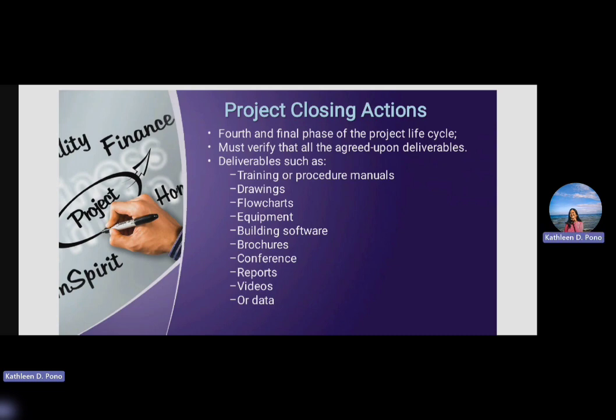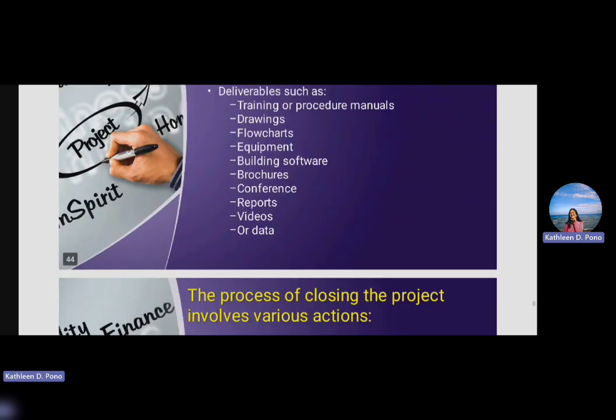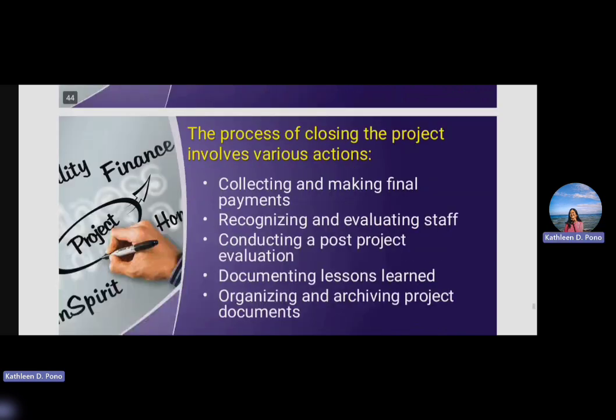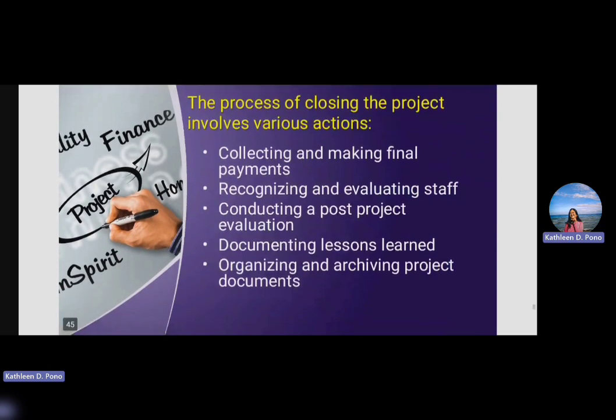So now let's proceed to the process of closing the project, which involves various actions. First is collecting and making final payments. This means ensuring that all financial obligations related to a project are met, including paying vendors, contractors, and other stakeholders. The actions involved may include reviewing invoices, confirming that all services and products have been delivered as agreed, and reconciling accounts to ensure all payments are accurate and complete.